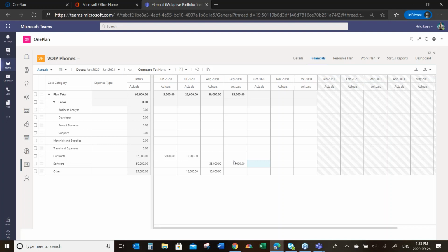Number two, the resource data, you'll notice none of that's been entered yet, is we can pull that from the timesheet system that we have here, or from task updates, or potentially from actuals that were captured in Microsoft Project or elsewhere, and we roll those through, and with a rate in the background attached to that role or to that resource, it can funnel to here as an actual.